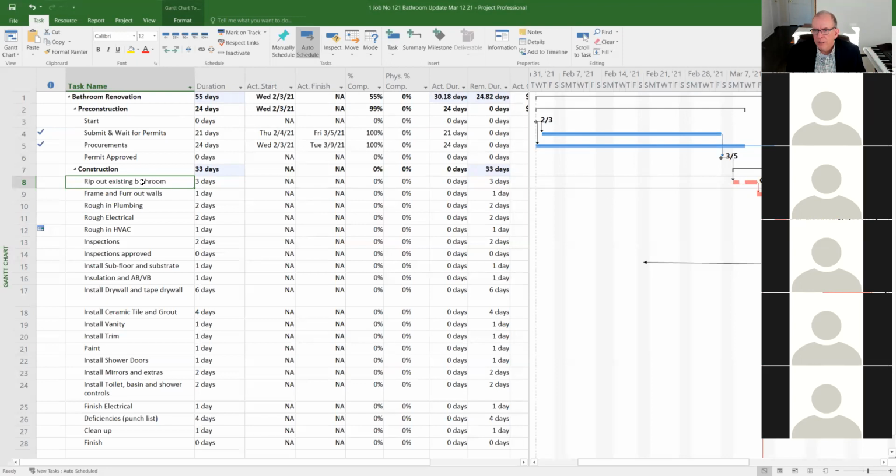So at the end of a project, you could say we had 45 bad weather days. Why is that important? Well, in your contract, you may have had a weather calendar that allowed for 30 bad weather days. Well, if you end up with 45 bad weather days, that means that you can get an extension of 15 days to the contract.